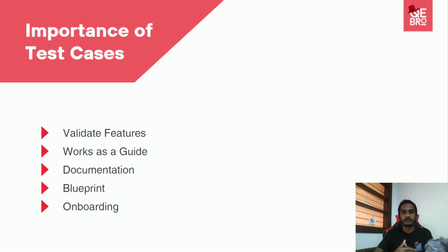The developers also can go through the test cases, probably when we do the brainstorming, then we discussed these things. When we do the mind mapping and the API test metrics, we do the brainstorming. So there we discussed these test scenarios with the developers. Developers also can get an idea about the corner cases and edge cases through these test cases, and they also can cover those while they do the development. And for the project managers also, they have the clear stats, how many test cases are there. From that they can derive the time, so they can do rough estimations.